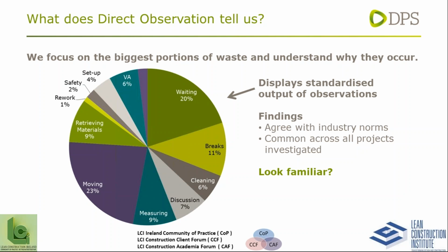Yeah, in order to show people where waste has occurred, we have published process maps. We haven't gone down to takt time and value stream mapping, because during a 10-hour period you could be recording up to 400 to 500 observations. You wouldn't be able to fit a value stream map onto that, but I think it's very good feedback. We find that a process flow map is enough to communicate where the opportunities lie. Okay, very good. Thanks, Richie.